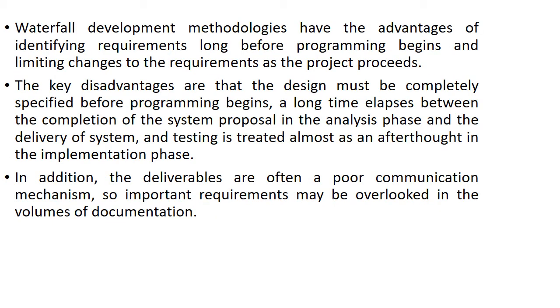If we talk about the advantages of waterfall development methodologies, we can see that they have the advantage of identifying requirements long before programming begins, and for this reason we have very minor changes in the requirements. So it means that the waterfall development methodology helps us to minimize requirement changes in the progress of the project.